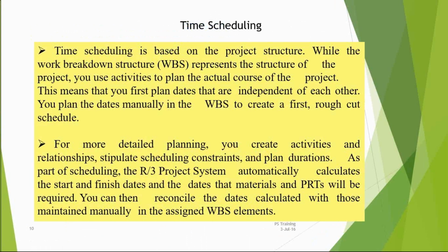I'm going to do my time scheduling through activities. If you ask me why can't we do it through WBS, yes, we can do it through WBS also, but we cannot establish a relationship between the WBS elements. We can establish the relationship only between the activities. And hence, whenever we are doing proper scheduling and proper cost planning or anything, we should have the activities. Then only can we use the system to the maximum level. Else, if you are using only the WBS level, then yes, we are going to capture it manually. We are not using the system to the extent. Got it.